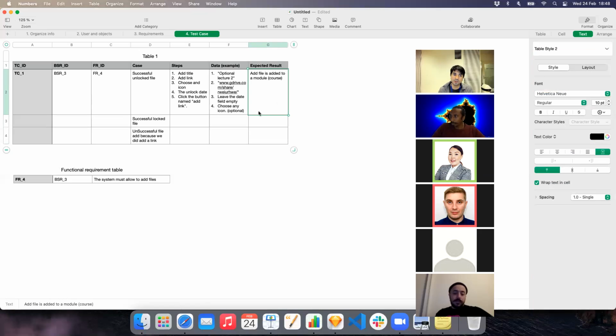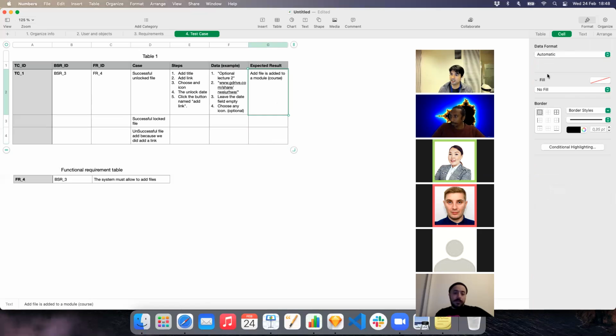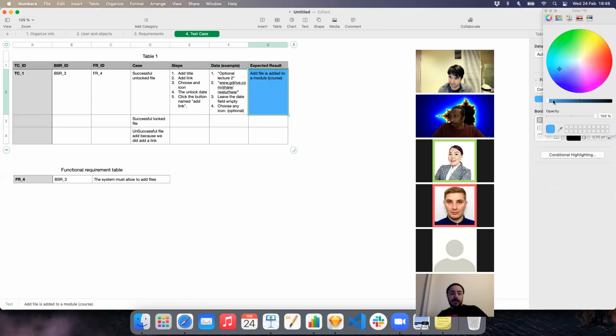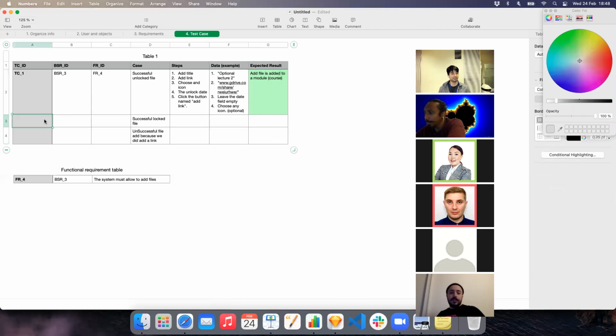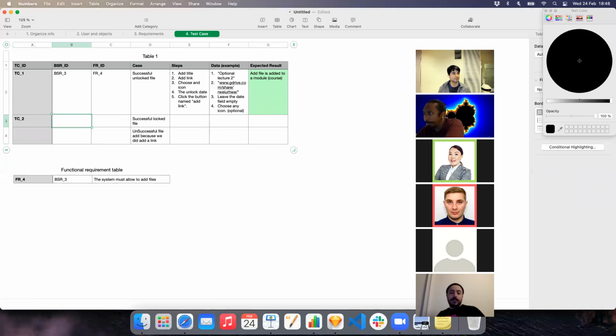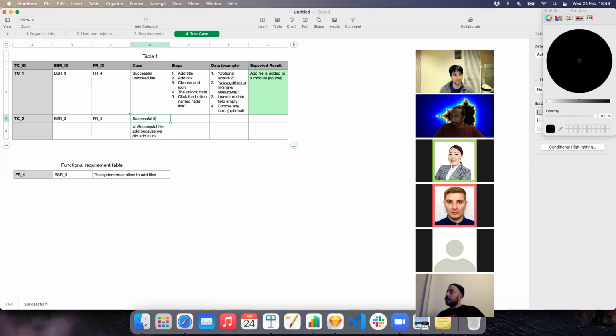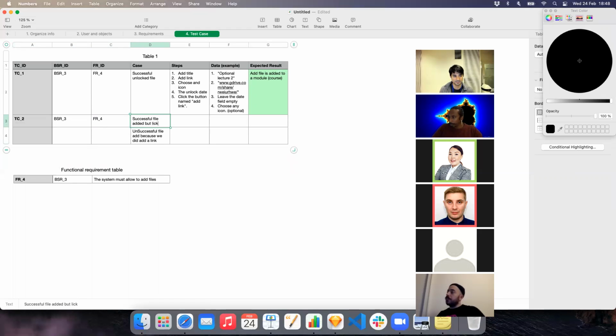And because we want to know that this is a successful one, we're gonna, this is not obligatory, but this is a good practice, by the way, paint it in a light green, because then by just checking the color, you can see which cases fail and which ones succeed. So let's create this one, TC number 2. Again, it's connected to business requirement number 3. Well, no worries, we're about to finish. Related to functional requirement number 4, and we say successful file added, but locked.